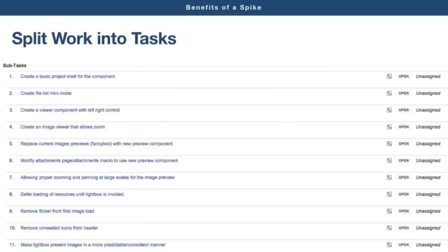And in Confluence, we use the decision blueprint quite a lot, especially for technical spikes. When we want to decide which approach to take, the decision blueprint already provides you with a blueprint, and you list the advantages and disadvantages, and at the end of the spike, you make a decision on a technical approach.